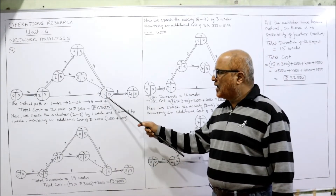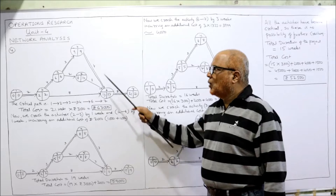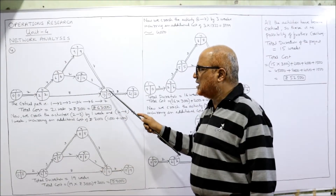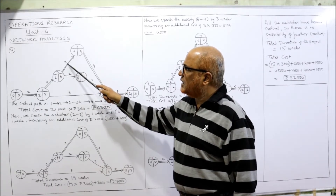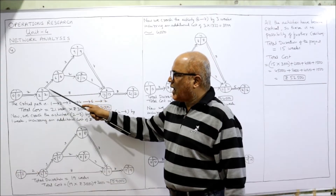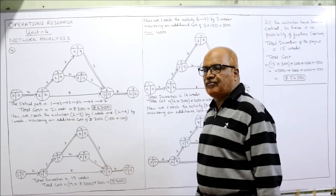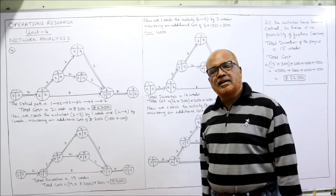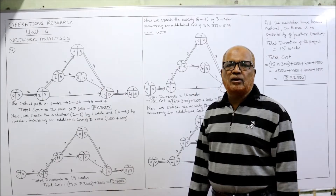Backward pass LFT: last event is 21. Subtract: 21−8=13, 13−4=9, 13−4=9, 13−3=10. At node 2, two arrows merge — take the minimum: 9−3=6 or 10−2=8 — minimum is 6. Then 6−4=2 or 13−8=5 — minimum is 2. Then 2−2=0. Critical path is where EST and LFT values are the same, shown by double lines.